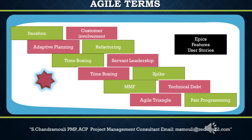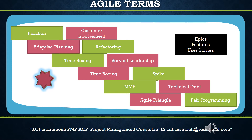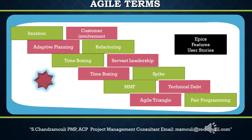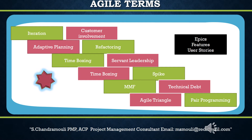Second, adaptive planning: adaptive planning expects to define only a high-level plan for far-end features but a detailed plan for the next immediate iteration. This is also referred to as rolling wave planning, as the process of planning for a project happens in waves as the project becomes clearer and complexities unfold. Only key milestones are highlighted in the initial stages for reference.